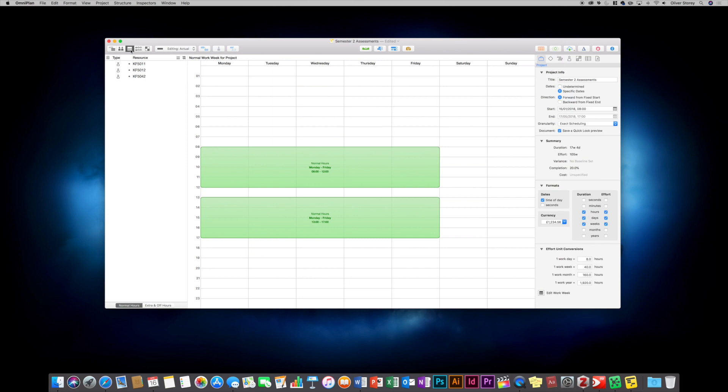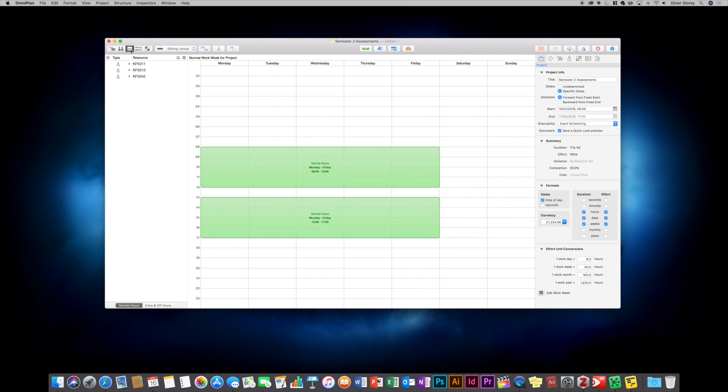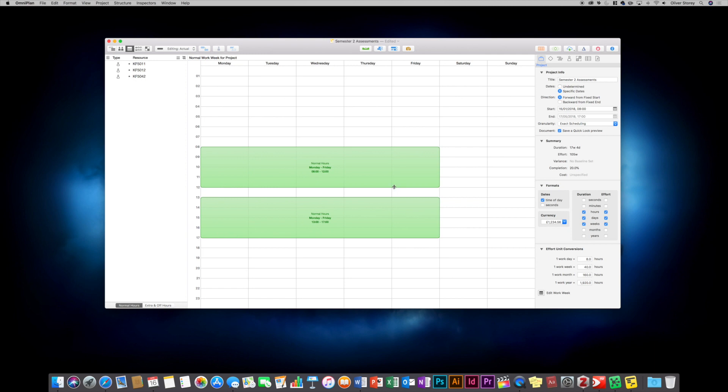The next view along is your work week view. This allows you to specify exactly what your working hours are. So I've got 8 till 12 and then 1 till 5. And what that basically does is, as you can see here, it tells you exactly what your effort units are. So if you specify a workday, it knows exactly how many hours are in your workday. Therefore, if you specify a whole project, it can break down individual tasks. And if you say a task is going to take me 8 days, it can break that down specifically into hours. So for example, if you're hiring something by the hour, it can really let you work out exactly how long you need.